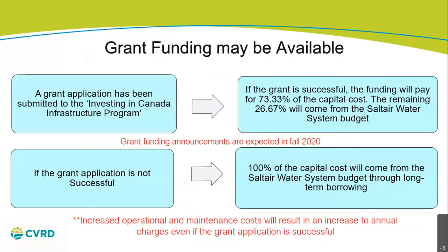Oh, and I should note as well that the operations and maintenance costs are not subsidized by a grant. So those costs will be fixed even if we do get the grant. The grant is only for the capital part of the expense.